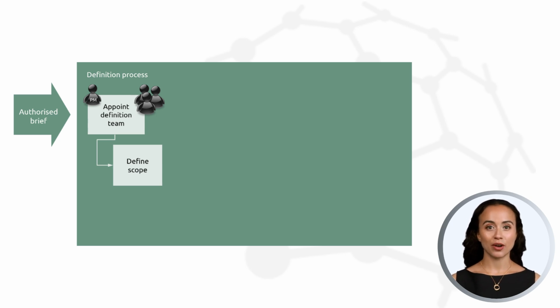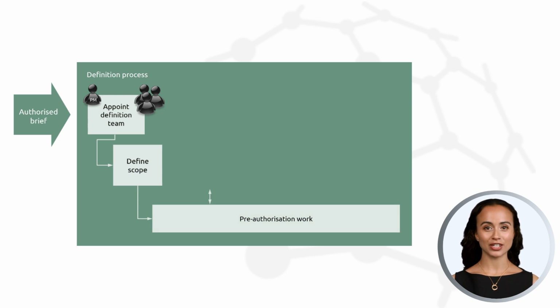The concluding goal of this process is to gain approval to begin the delivery phase. It may seem wrong to start any delivery-related work before approval is given, but in some contexts, there may be long lead times on certain resources needed to complete the work. As long as the financial commitments are low and acceptable, the sponsor may allow some preliminary work to proceed before the full business case is approved.